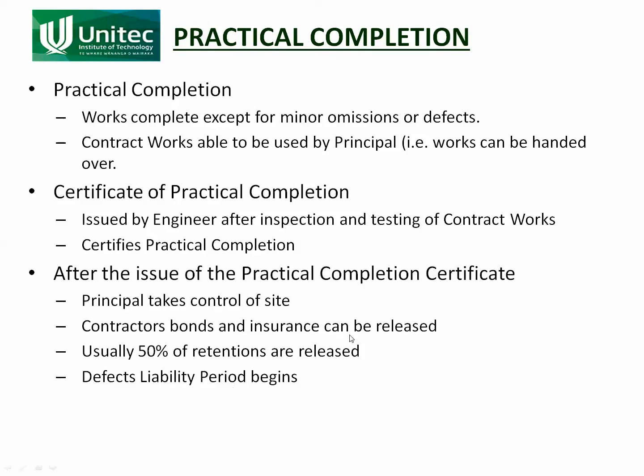The bonds and insurances are released, which means the contractor doesn't have to pay his premiums on the bonds and insurances, and the works are no longer insured. So at the time of practical completion, the principal really wants to have his insurances already in place, so that when the contractor's insurances finish, the principal brings his insurances online so that the building remains insured.